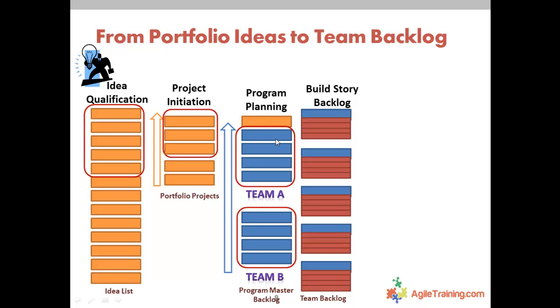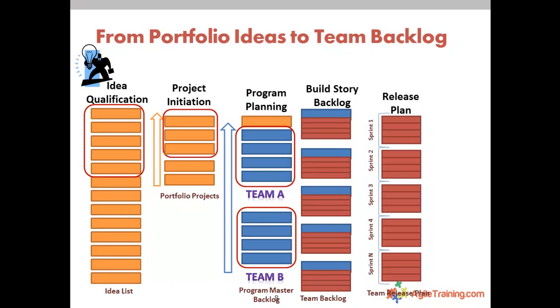So think of this as a much bigger item over here, maybe a theme or a deliverable, and these are features, and these features are going to be broken down into smaller stories, and the team will break down all this and create their own team backlog at the story level, and then the team might, if they're using Scrum, take those stories and begin to plan them out in various fixed sprints, right? So these 4 over here will get done here, and maybe this one, and this one based on priority. So this really creates now a list of the work that's prioritized top down, not just based on value, but based on dependency. And that's why maybe the word prioritization is the bad word to use, and maybe you should just say it needs to be ordered or sequenced in the right way for execution.